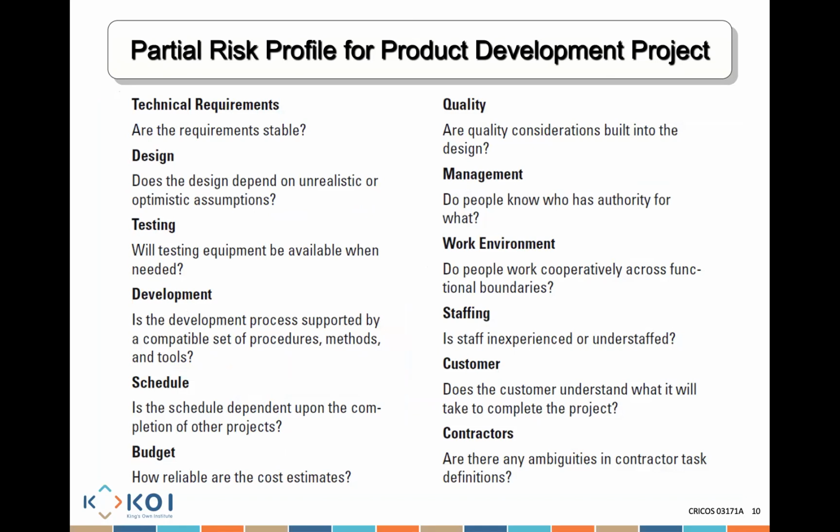But what I want you to bear in mind is, it's there because it gives you the foundation to find some of these things that would be relevant for you. For example, you might say, technical requirements, are the requirements stable? Oh, no. Okay, that's a risk. Design, does the design depend on unrealistic or optimistic assumptions? Oh, yes. Okay, well, that's a problem.